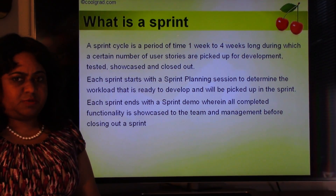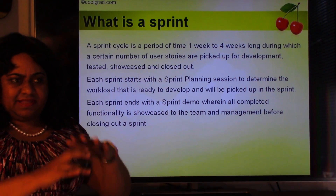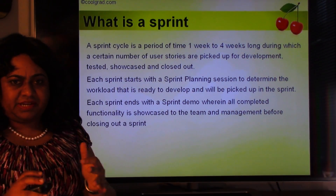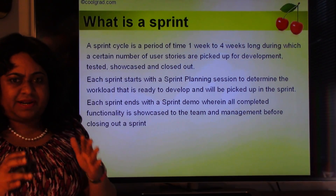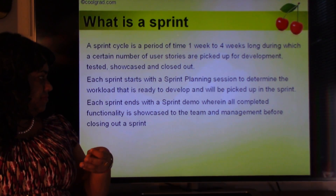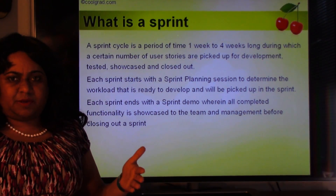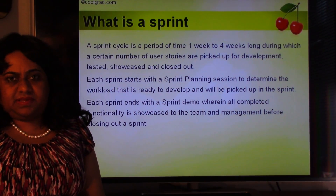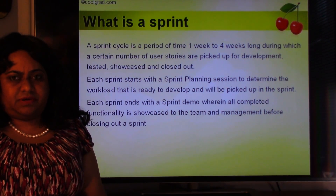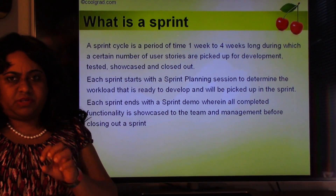Each sprint starts with a sprint planning session to determine the workload that's ready to be developed. Whatever is in the product backlog — where all the user stories reside — we groom certain stories, put in all the details, get the entire team to review, and clarify doubts. In the sprint planning session, we check the team capacity. For example, with ten members working eight hours a day over a ten-day sprint, we have approximately 800 hours. So we pick up stories worth 800 hours.